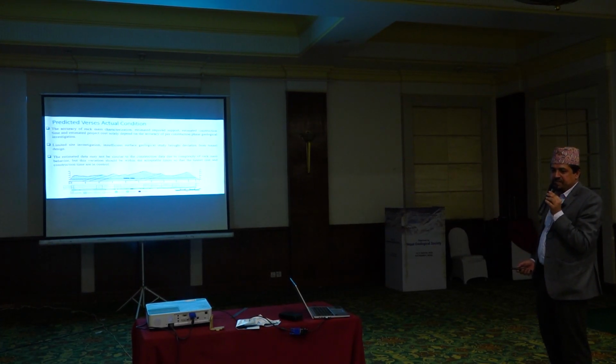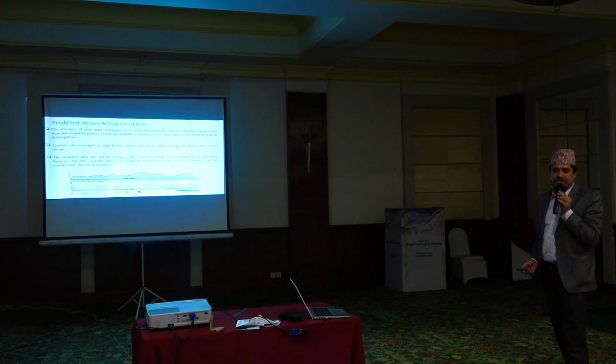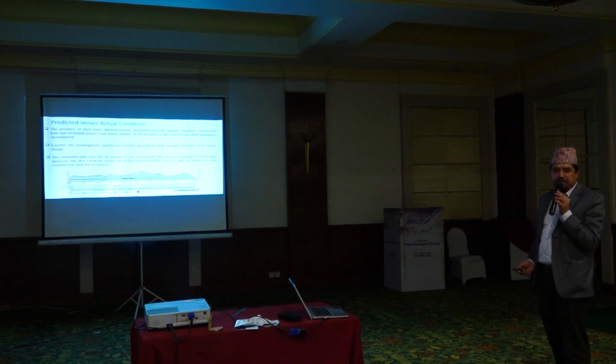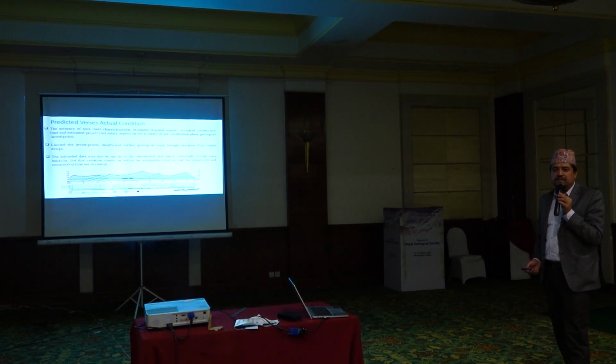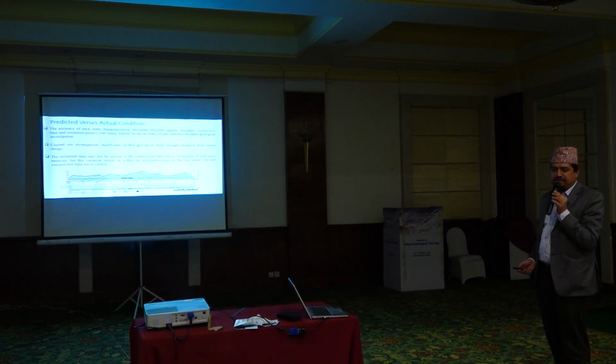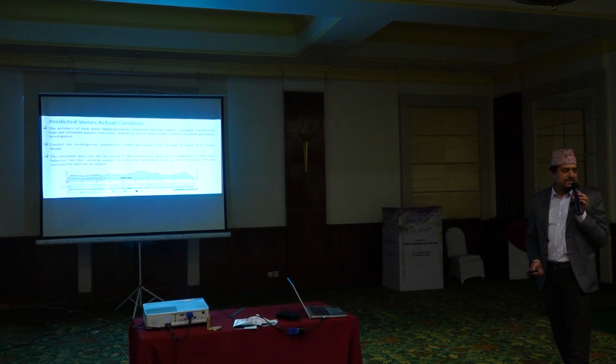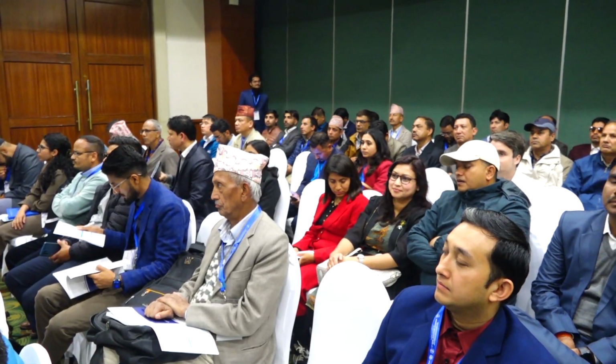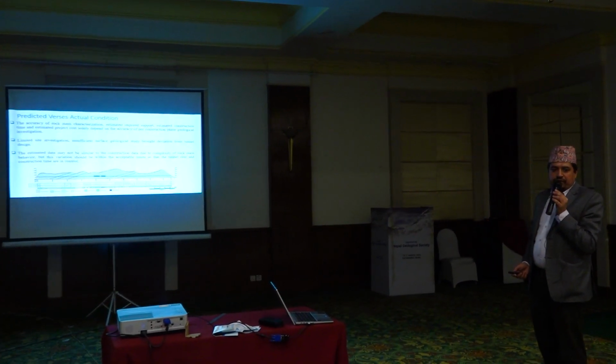This might be caused by the fact that during the pre-construction and design stages, proper geological mapping and geological investigation were not done, so that during construction we face that the rock mass and the support type written in the document and cross-section do not actually match the construction. We know that it does not match actually, but our duty is that we have to minimize the